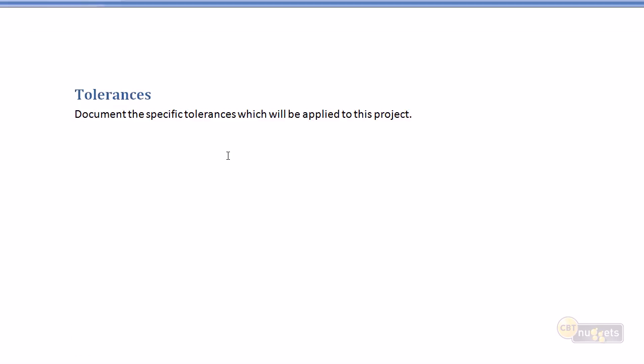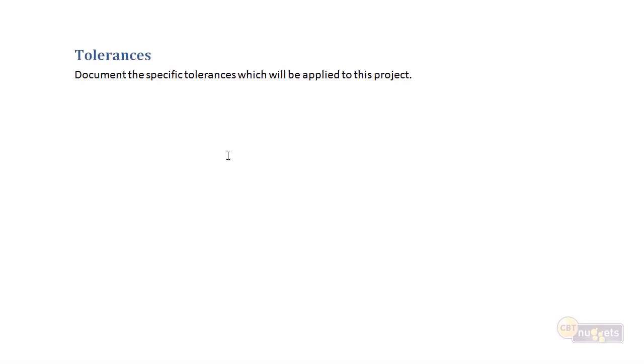Obviously, no plan would be complete unless we documented all of the project costs. And often the project costs will need to be put together over some type of project timeline. If this is a relatively short project covering only 6 months, your finance department is probably fine with a single number that says this project is going to cost $50,000. But if your project is large, involving multi-millions of dollars and covering multiple budget years, finance is probably going to also want a bit of a timeline across the project costs so they can do appropriate budget management, time management, financial management.